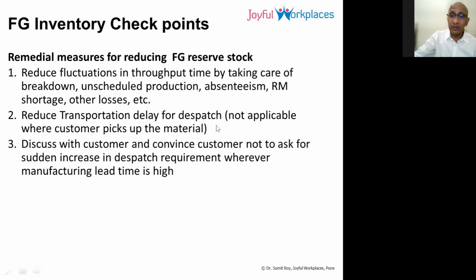Reduce transportation delay for dispatch, not applicable where customer picks up the material. Discuss with customer and convince customer not to ask for sudden increase in dispatch requirement wherever manufacturing lead time is high. So I think that they will understand that, but you have to indicate that I cannot really continue for a high lead time item, because high lead time item means its value add also will be more. So cost implication will be more. So everything is possible provided you are paid for it, but it is not suggested actually.